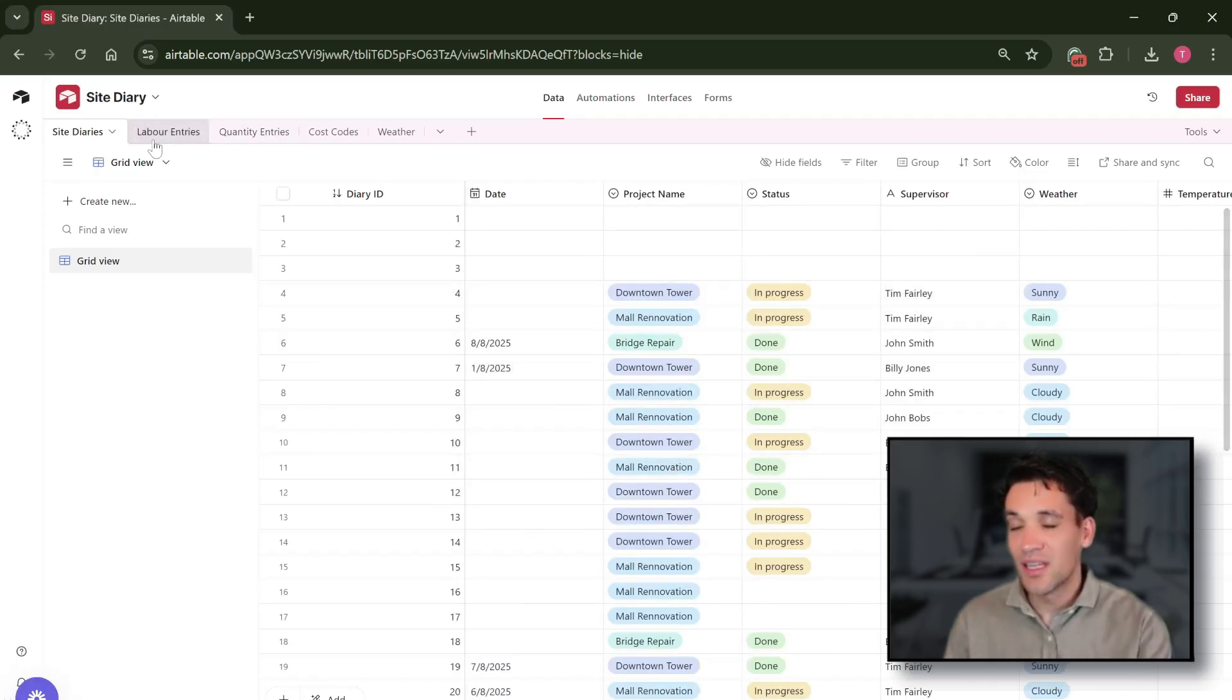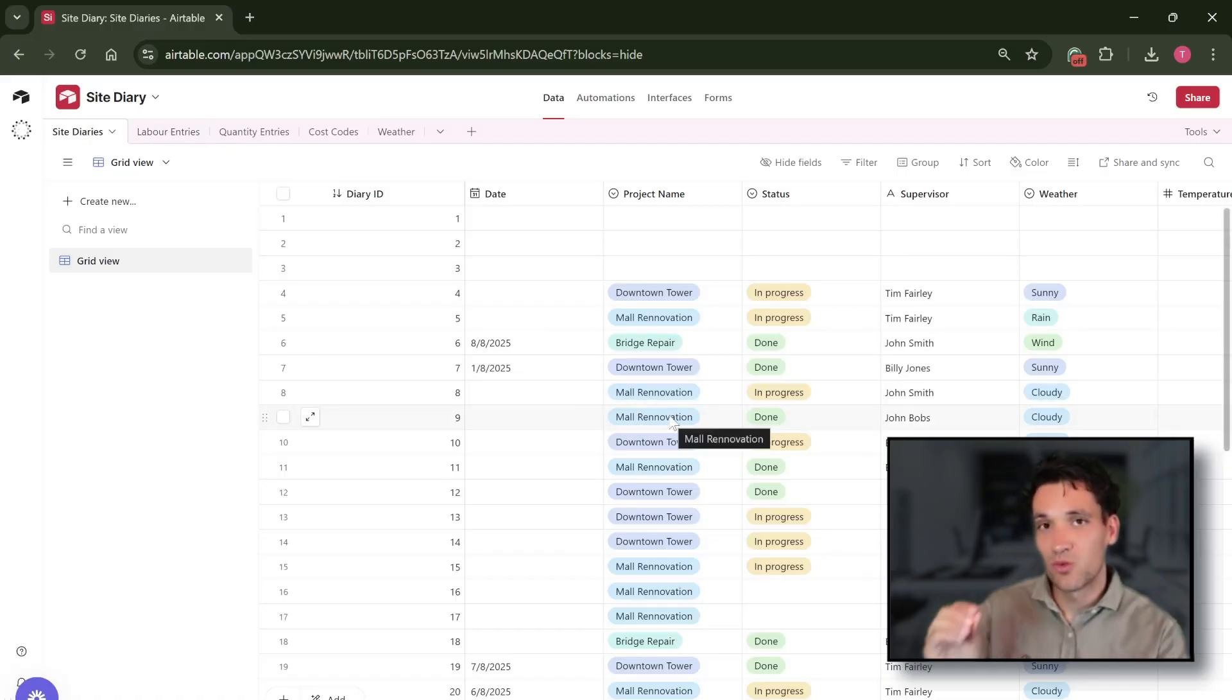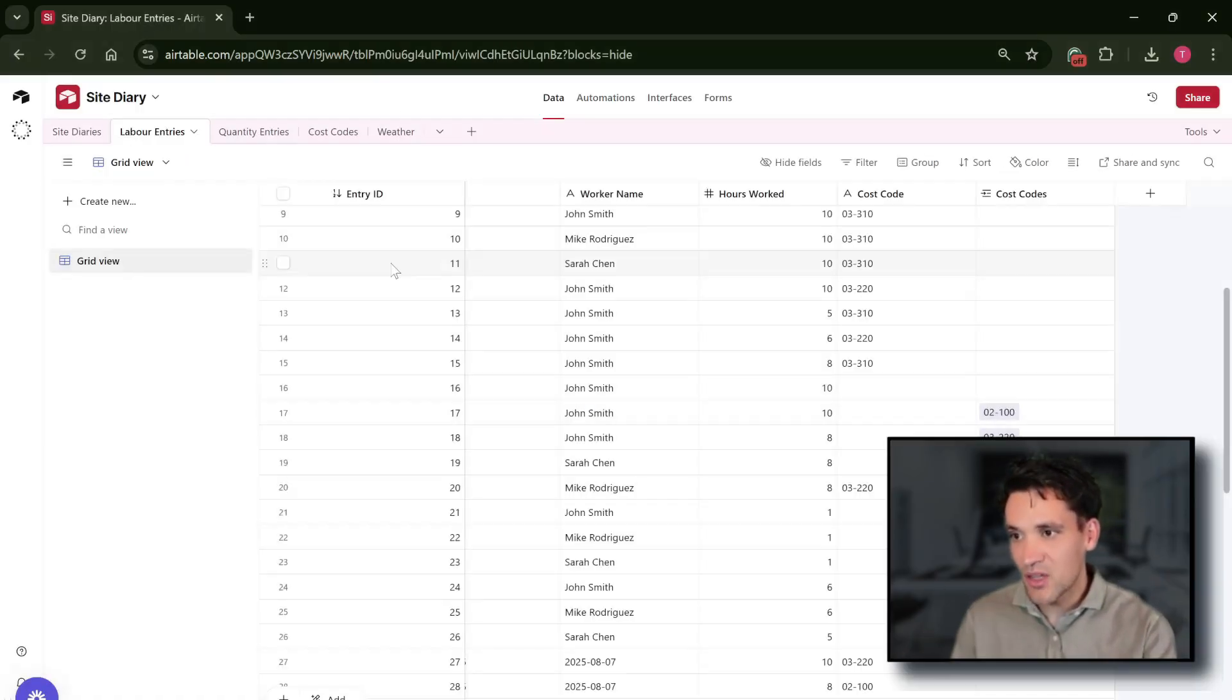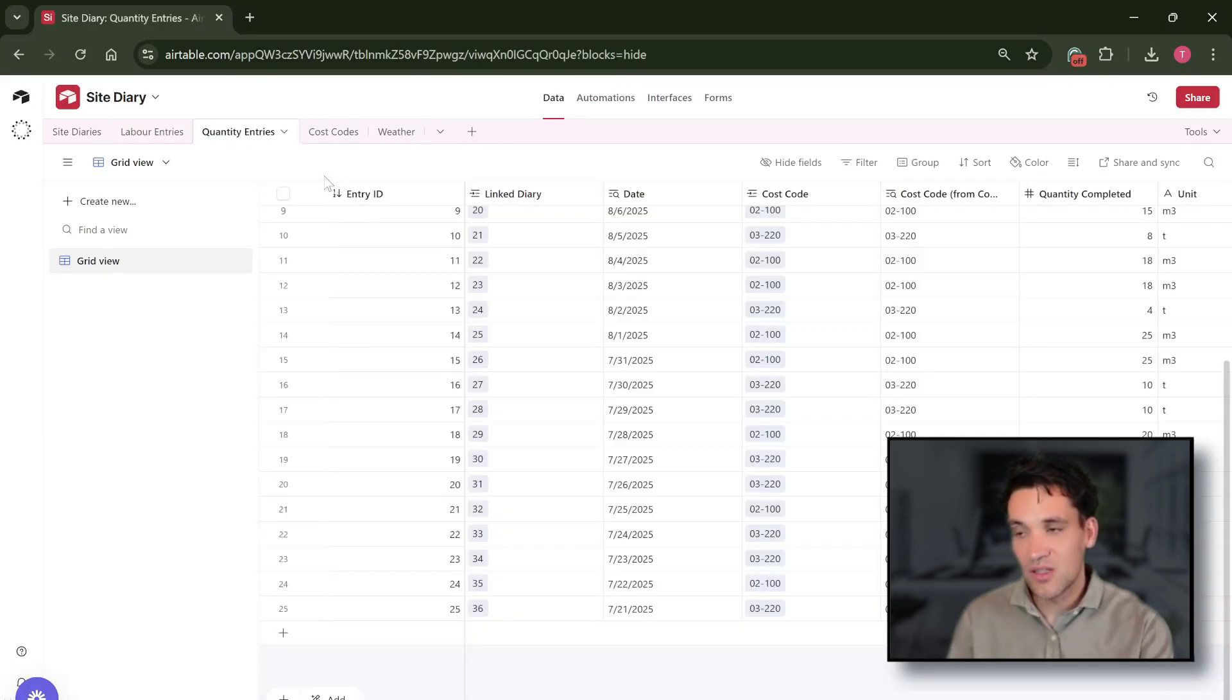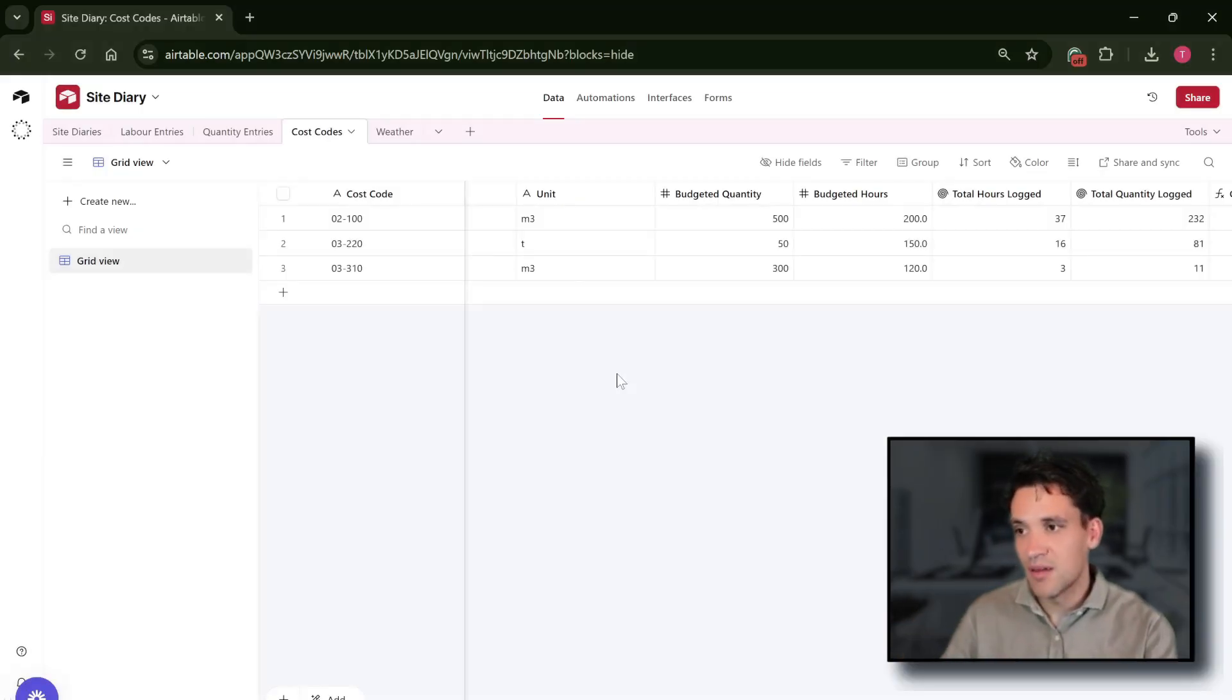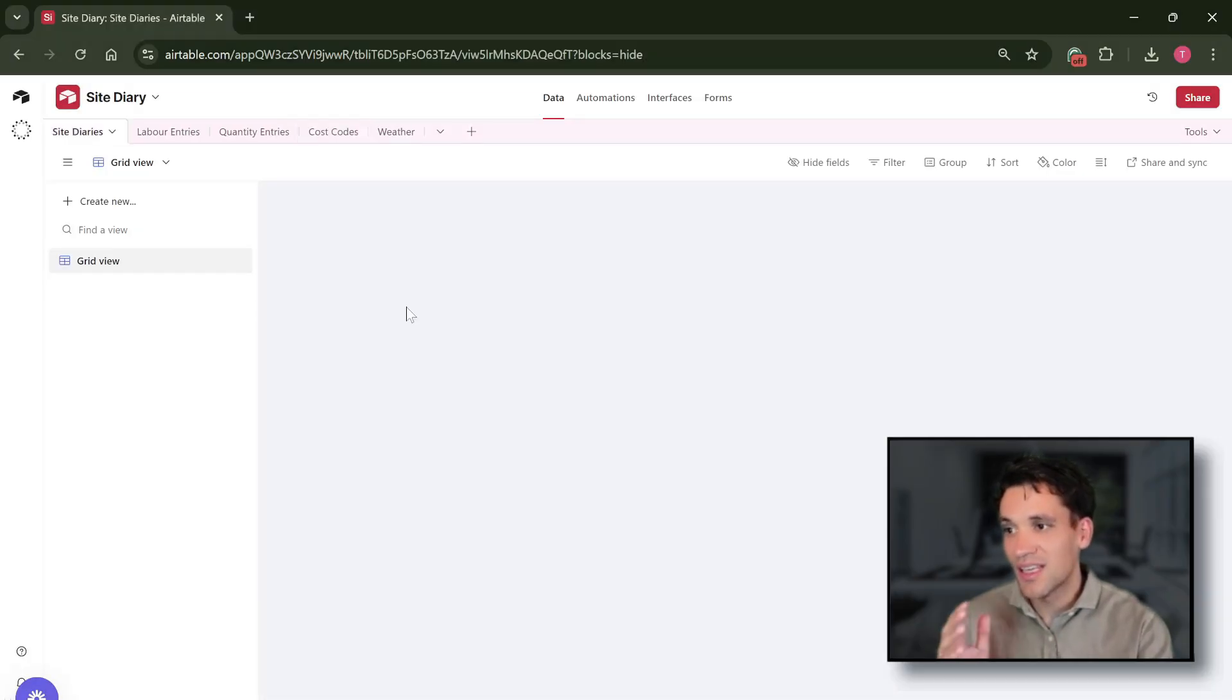You can have a variable number of tables. So for example, for this site diary we've got a site diary table where the original site diary entries when the form gets filled out gets stored. We've got labor entries which track all the individual labor entries that go into the site diary, quantity entries that do the same thing, and cost codes which is then the summary table where all the hours and work completed track against the different cost codes.